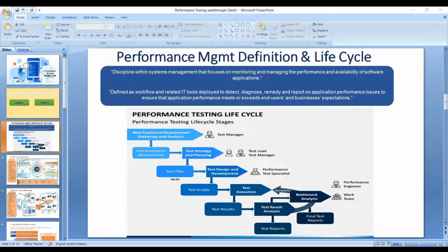Something similar happens in performance testing projects also. Sometimes a requirement will come from the client, and as a manager or lead, you're not sure whether it might be possible. You don't say no; you say, "Give me some time, I have to do some POC on this." Basically, we call this proof of concept. We gather all the information we need to do the testing, and we try whether the testing is possible with the existing tools or the bandwidth we have in our team. If that is possible, we give a go-ahead. If not, we let them know that it won't be possible for us.